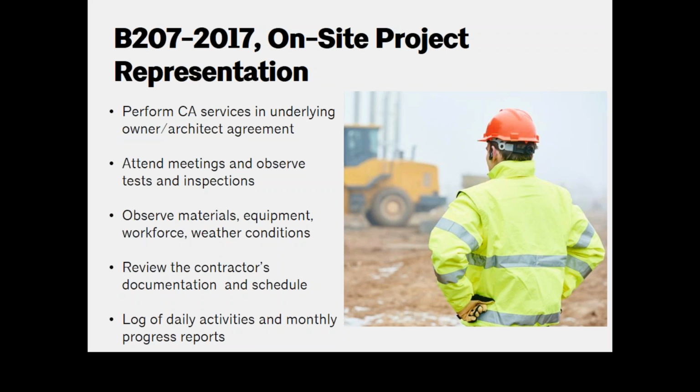Those kinds of things can be very important when it comes time for the architect to certify payment applications that the contractor has submitted, that they actually are on the site to see what kind of labor force has been on and what kind of work has been done and what kind of equipment and materials are stored on site. So that's a big benefit to an owner to really have more accuracy and better attention paid to those kind of things by an on-site project representative.